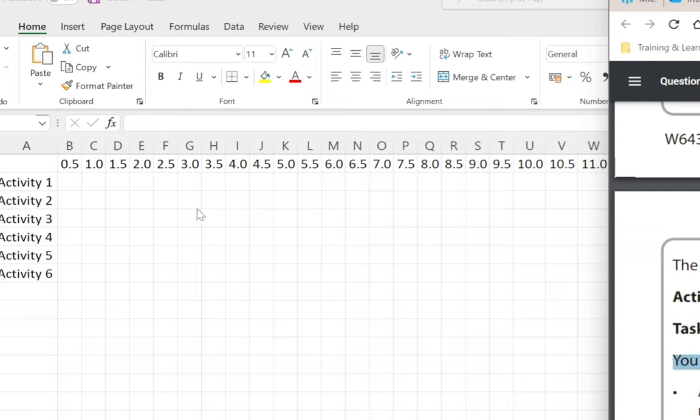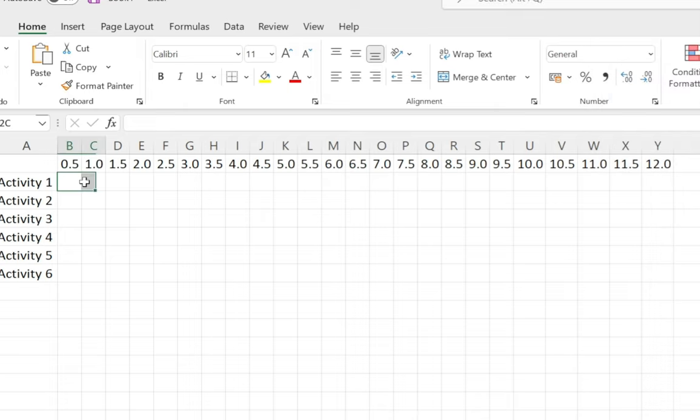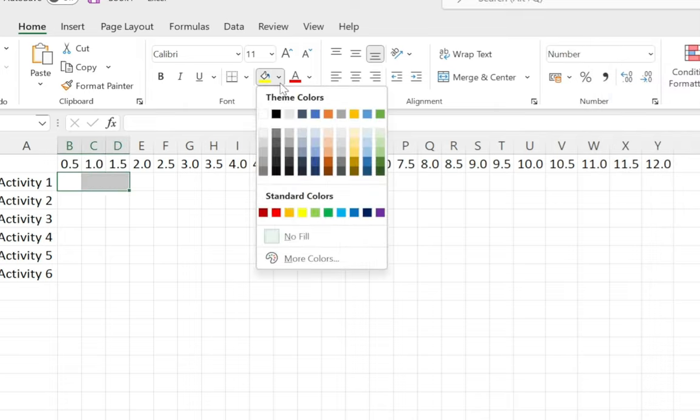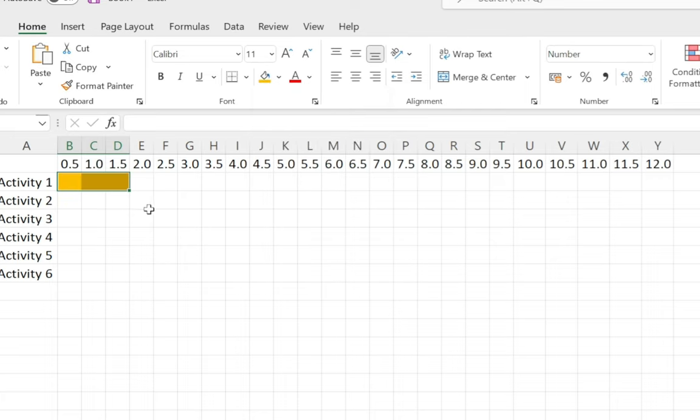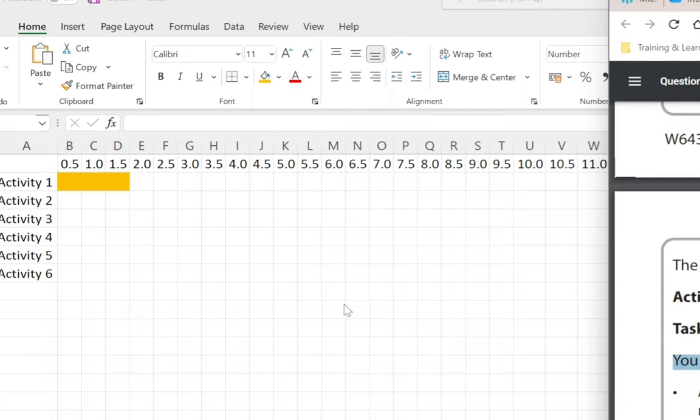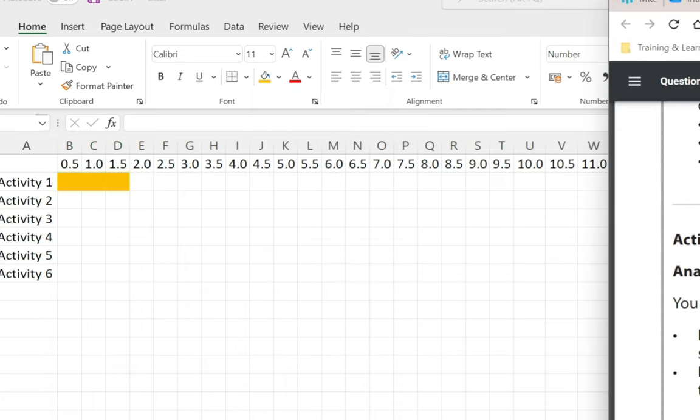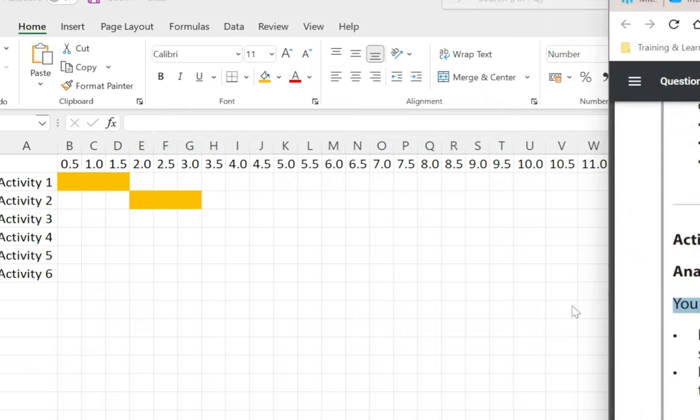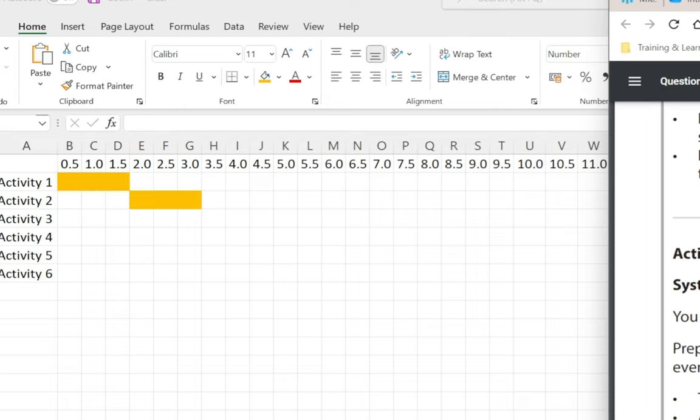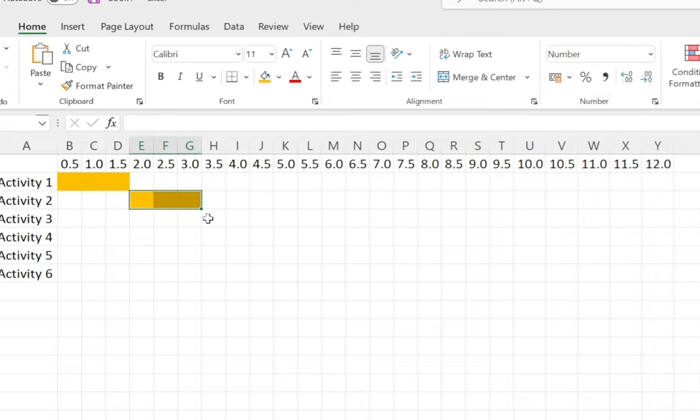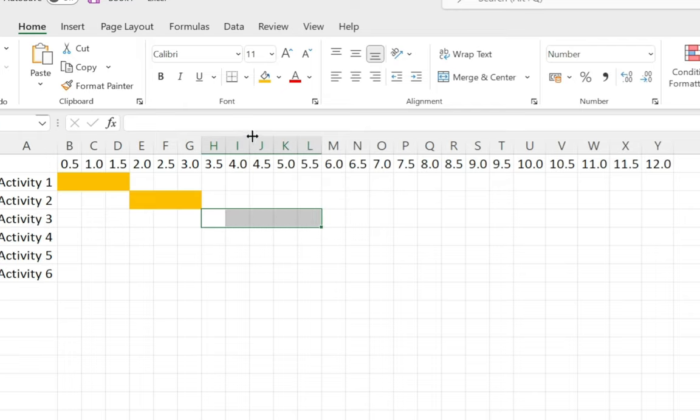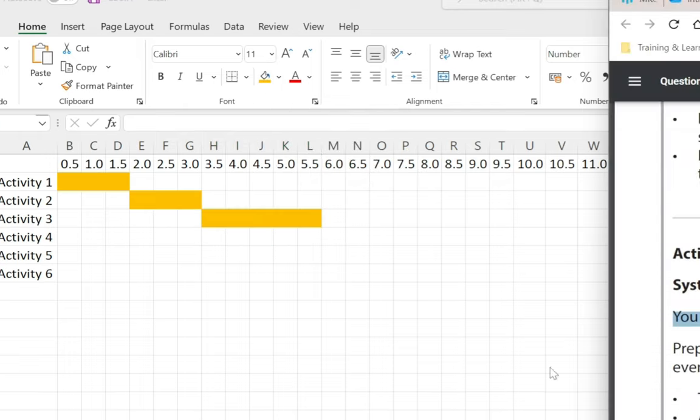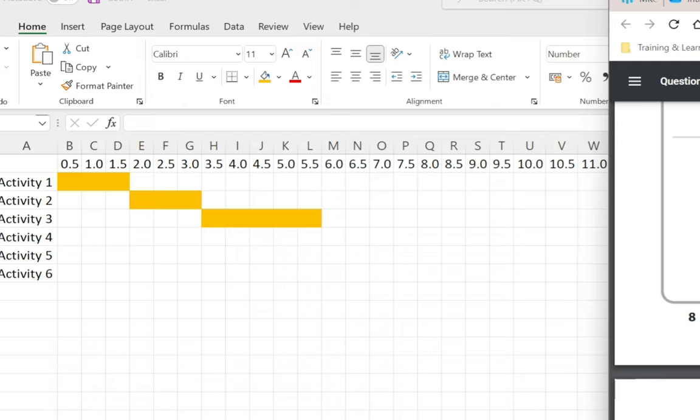Activity 2 says 1.5, so that's another three. Activity 3 says 2.5, I know that's going to be five of them: one, two, three, four, five, and then color it in with fill color.